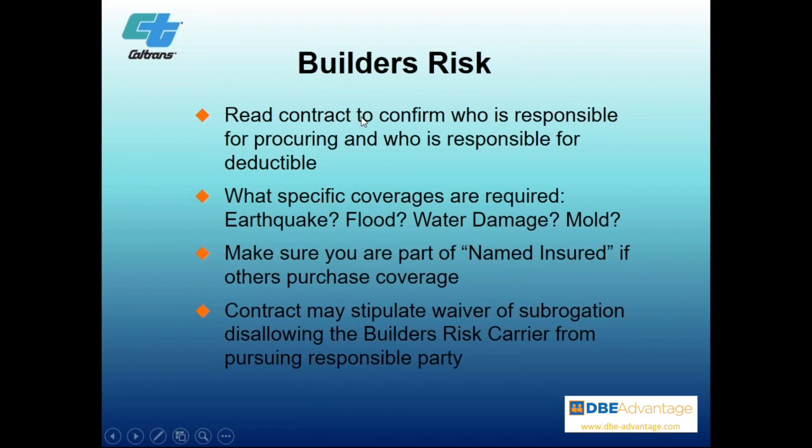All of those types of things can be in there under the builder's risk contract. You want to make sure that you're named as part of the insured because you want the actual settlement payment to be in that chain with the owner so that you have a say in the allocation of those funds and where they go.